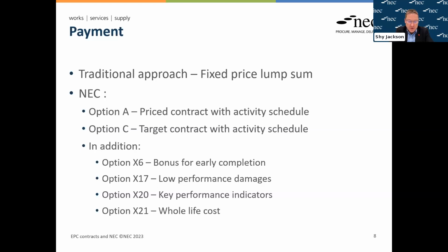When we look at target contracts, I always think there's a couple of points to note. First of all, it's a bit of an obvious point, but the target has to be realistic. It has to be a target that is achievable, that reflects the real cost of the works, because if the target is too low, for example, then at the start there is already a focus on recovery, and that does not result in the joint incentive to collaboration and the alignment of commercial interests.